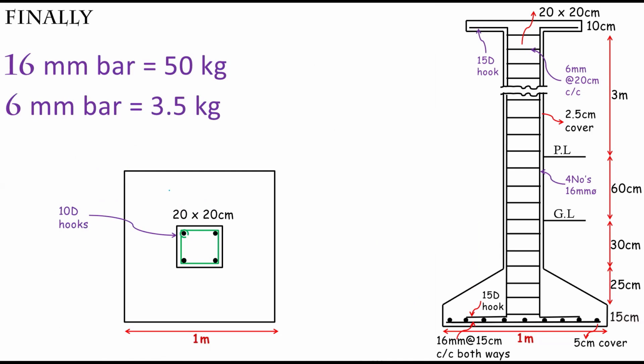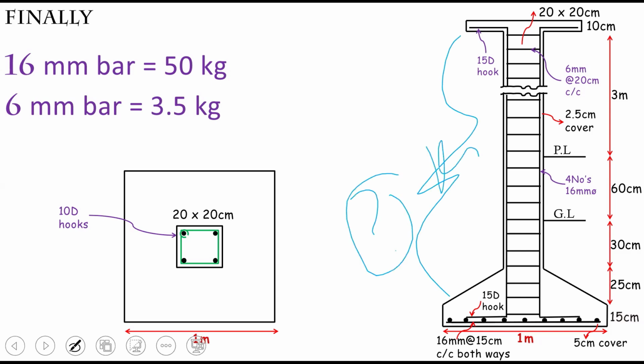All right. Now, it's also important to note that if the project is a heavy project, we may need to determine the binding wires. However, for a small project, let's say if this is only a column, then the binding wire for this can be a very little thing, okay? Maybe 1 kg or 2 kg, okay? Maybe less than that, okay? So it's never necessary. You can just demand it maybe like a lump sum, okay?